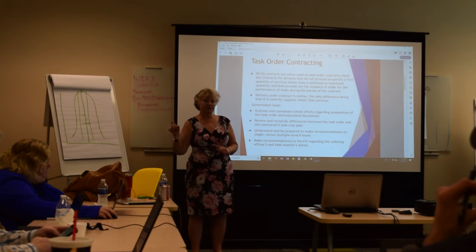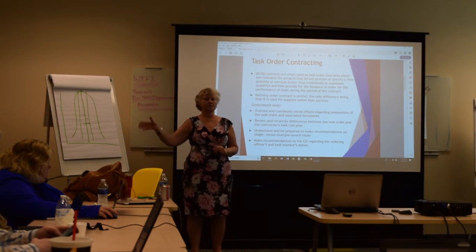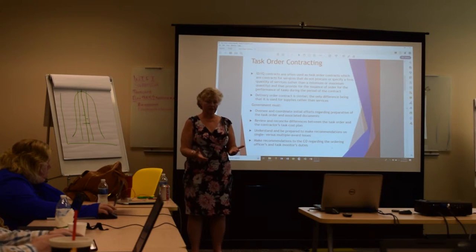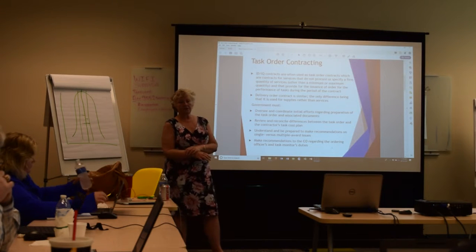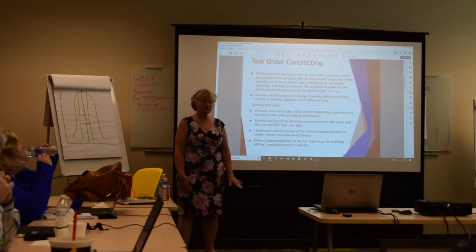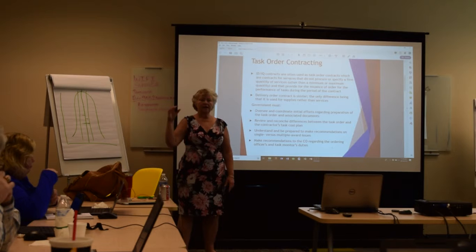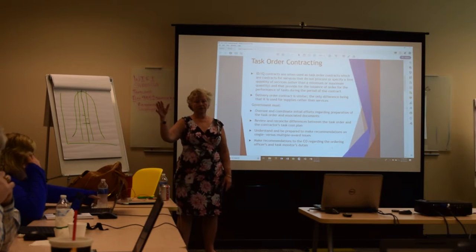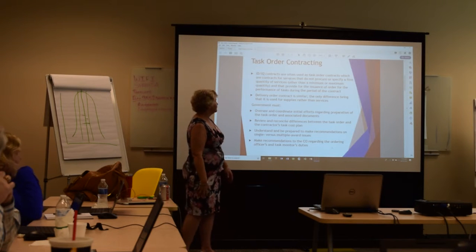And here's a description of each of those labor categories. And then here's the price for year 1 of the contract, here's the price for year 2, 3, 4, and 5, whatever the requirement is. So that's what you give to the government. The government will typically tell you in an RFP some minimum number of hours that they'll buy from you, and usually it's not a big number, and some maximum number. It's not really helpful information because it's going to be anywhere in between there.